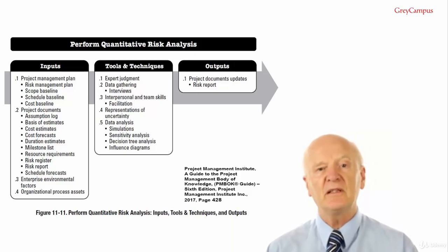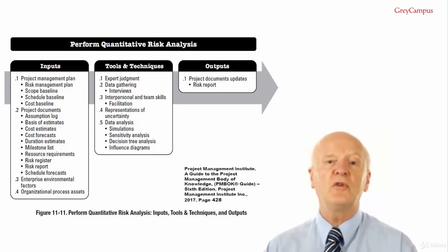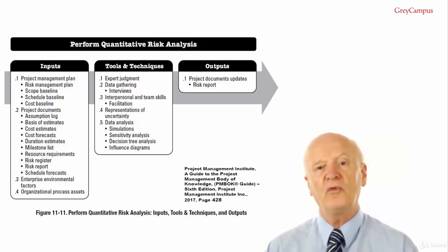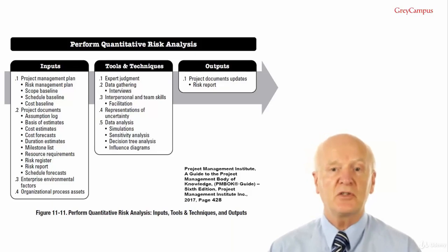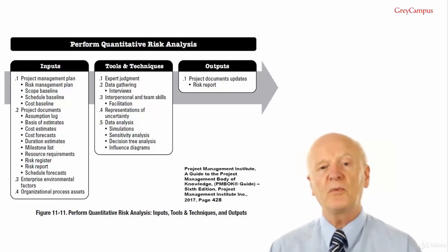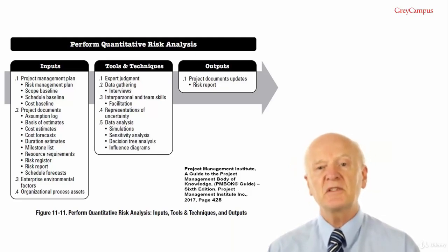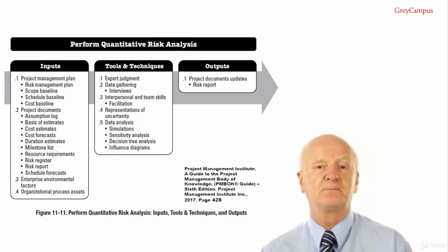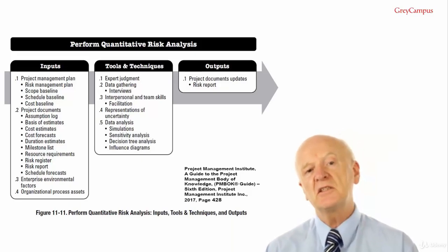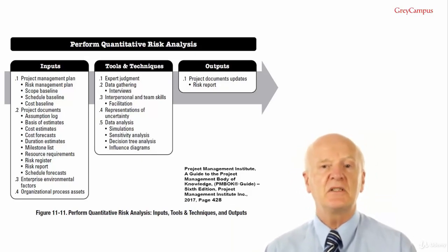If the coolant pump fails, it will trip the electrical overload circuit, but the overhead lights are on the same circuit and they will be switched off too, causing hazards for the operators who are working below. And so as you can see, these risks have to be treated as a system of interrelated risks rather than just an isolated risk. Tools and techniques number 5, data analysis.